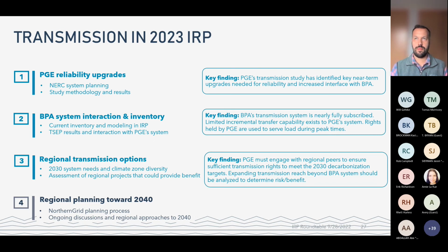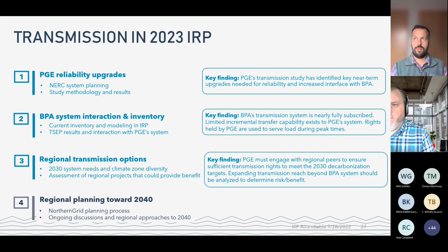Having talked to the engineers that put that in there, there is zero permitting timeline in there. So that schedule was 3 to 4 years of design plus 4 to 5 years of construction equals 2030, with zero permitting or NEPA whatsoever. So that 2030 schedule date is probably more like... Bonneville is prohibited under its federal tariff from doing NEPA until design is fully completed. So they're not actually even allowed to move forward for 4 years with starting that process, which means they would be starting NEPA in maybe 2026 or so. And so that timeline needs a plus 5 to 15 years, and I think 10 years is probably an optimistic number there.